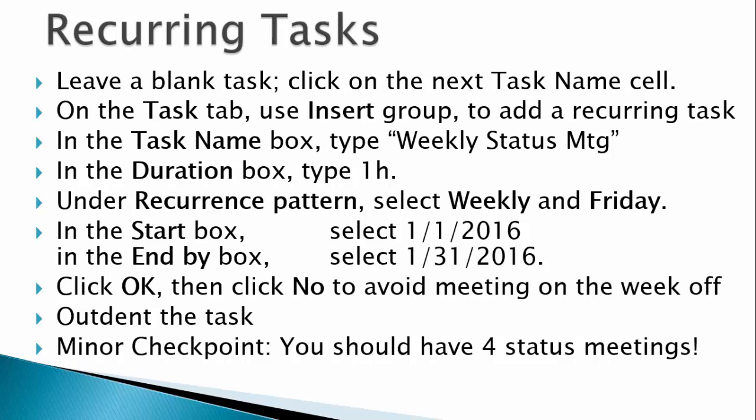You'll notice the task appears to be a part of the public launch phase by default, so we can use the outdent function so it stands alone. At this point, if you want to be sure an hour is subtracted for the meeting, be sure to assign participating team members to this task. This may overallocate some team members. Not a serious overallocation, so you don't necessarily have to do anything.